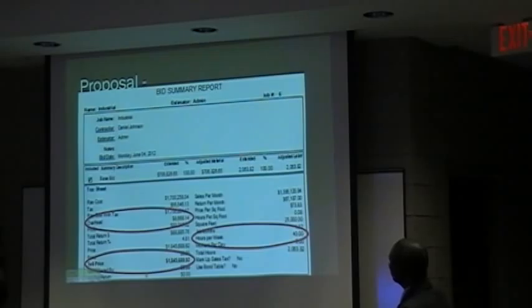Here we have the bid summary report. I just want to talk a little bit on the overhead. This is our overhead here, which is 10%. And we have the selling price, which is amounting to, when we put in our overhead and profit on the material, 10%, and the tax, then we come up with the selling price of 1.845 billion.